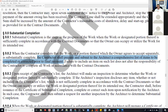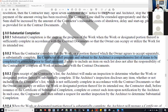Why is the contractor the one who generates the punch list and considers himself substantially complete? Because he's the one building it. If you're building a house, you should know when it's done — you're the one reading the drawings, interpreting them, and building. You're the one who knows what's missing more than anybody else. Think of it like a puzzle: if I'm putting together a puzzle and I still have five pieces left, I know I'm not done. When all the pieces are in and it looks like the picture, we're substantially complete.